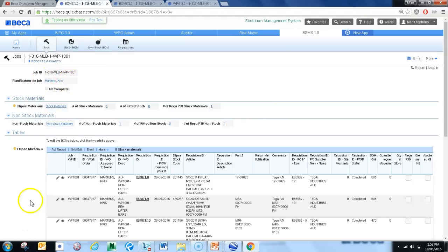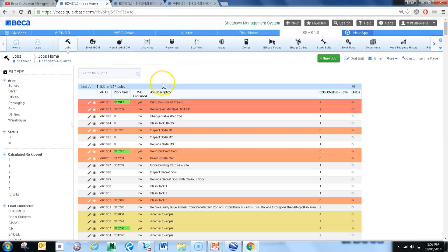So the really neat thing about this being an online internet database, while you have a secure access, is you can send this to other people with the same secure access as a link. So I can just send that and it will send a report of the same thing that you're seeing here. The other thing is you can create exports from here. So you can create an export to something like Primavera P6 to do your resource leveling, or Microsoft Project. Or you can create an export that you can create a Google Earth KML file.